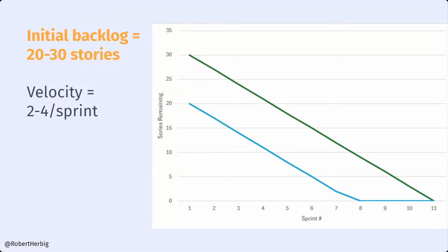And so we should start by acknowledging that even if our backlog today is 20 stories, that doesn't mean that to do all of the work, we're only going to do exactly those 20. It's an easy abstraction, and it's easy to talk about the backlog that way, but it does lose out on a big source of complexity, and it's an easy way to back ourselves into a false sense of confidence in what we're doing. So I really do encourage us to treat our backlog as a range.